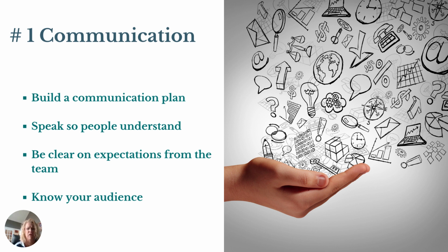It's about what the schedule of events is that are going to be taking place over the course of the project. What is it that you want to communicate throughout the project? What's important in each of those messages, and who is the audience that you're communicating to? So there might be different communications that go to different audiences. That's something you need to include in the communication plan.